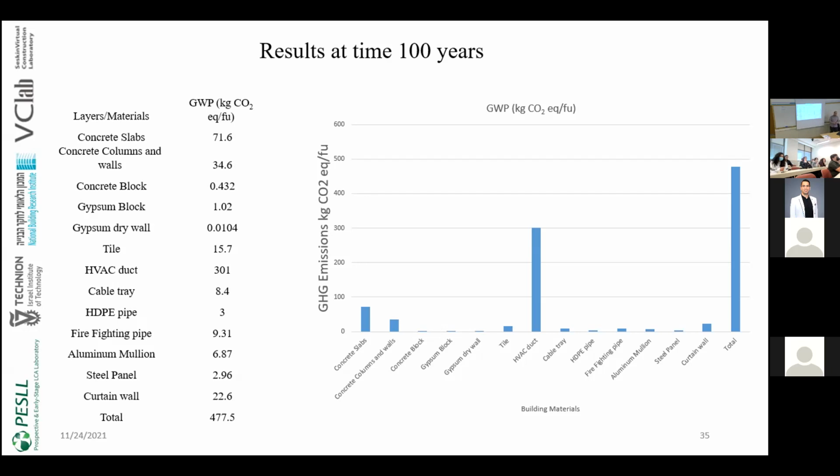Now, in the second step, I started collecting data in this project related to the flow, which includes the start and finish dates for each activity in order to calculate the flow. Also, I started collecting some data related to the resources used in the project, like how much electricity they consumed and how many man-hours, in order to start evaluating the effect of the flow relating to the transformation perspective.